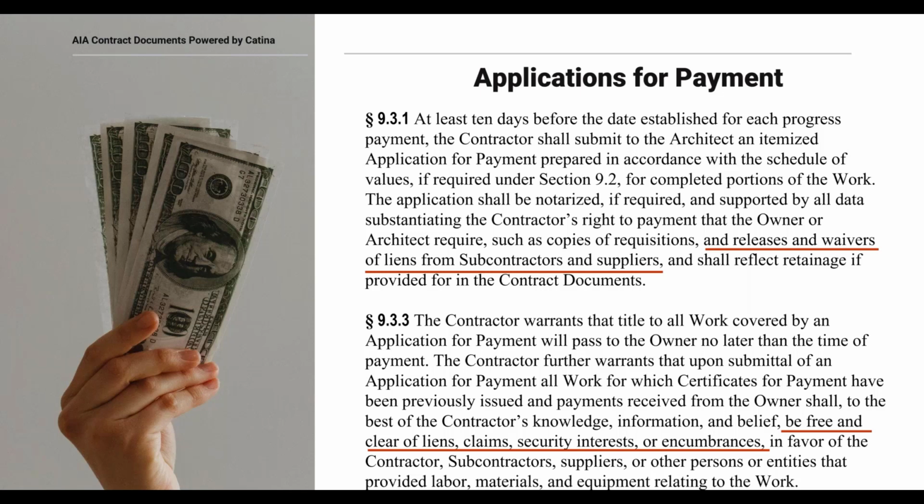As it relates to final payment, we have two other lien waivers, and those would be the G903 and the G904. All of the numbers I just mentioned, those are our generic forms that are related to lien waiver and release forms. So we have the generic ones, and then we have a variety of state-specific ones as well. Awesome, thank you, Sara. And we'll get into a lot of those nuances of what she was just mentioning here later on in the program.